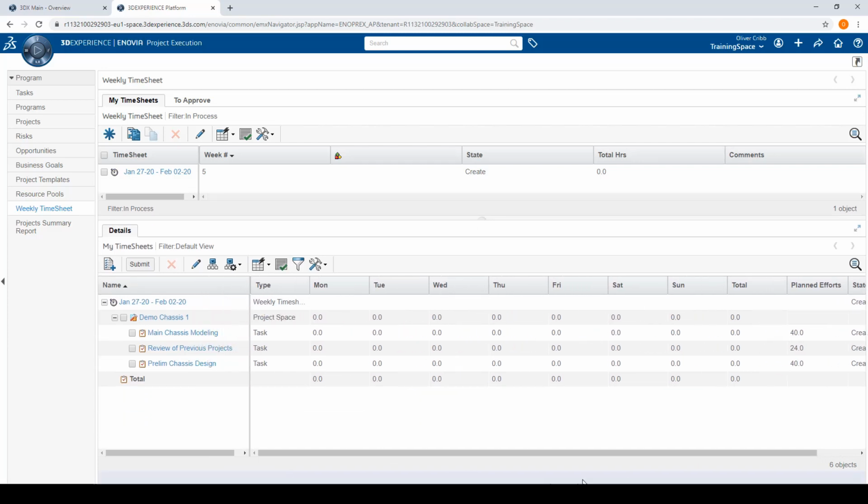First of all, notice the planned efforts column on the right-hand side, as this provides us with an estimate of how much more time is expected to be spent on the selected tasks. We are still planning to spend a week, 3 days, and another week on these 3 tasks. This is useful in that it indicates if I'm spending more or less time on the project compared to what was planned.